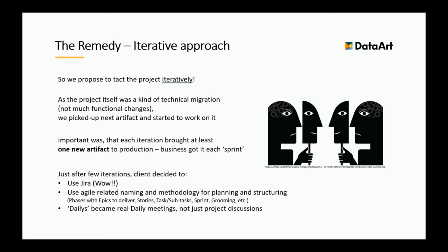It was not so before, because of the waterfall way of conducting the project, with extremely long cascade phases. The time to market was something around 8 to 12 months, so from the last discussion with the business, the people who actually need the software, to ready software was more or less a year.